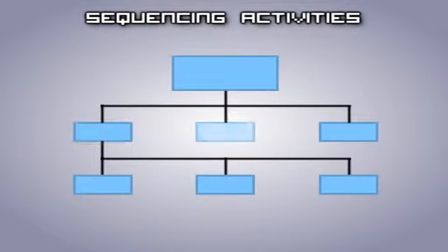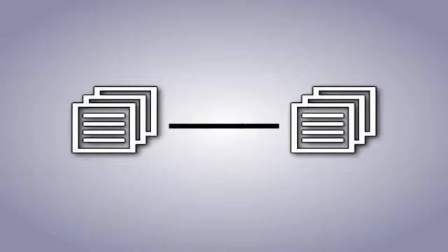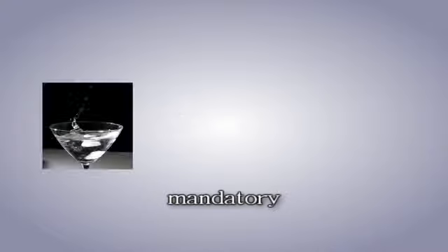This process reviews all activities in a work breakdown structure to identify relationships between the activities and classify all dependencies. Some project activity relationships are logically mandatory, while others may be logically discretionary. One example of a logical mandatory relationship could be that water must boil before coffee can be made, whereas an